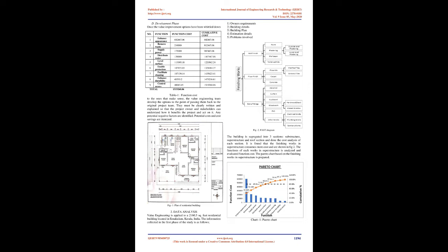Schedule, costs, budget, risk, and other non-monetary issues are studied until the team is comfortable with the concept of the project, what it is to produce, and who its end users are. This step also includes things like site visits and meetings with the project team, if required. Project documents like plans, drawings, specifications, and reports are obtained and the value engineering team becomes familiar with them.